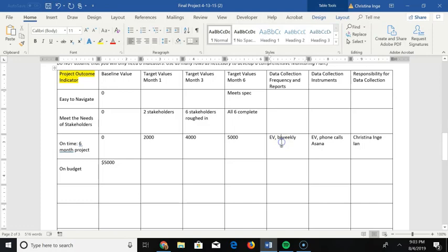And if you are going on a bi-weekly schedule, the assumption is going to be that the only reason you're measuring so infrequently is because you have close monitoring daily on an informal level with the team. In other words, you're all in the same place and you can check in on them several times a day. Otherwise, you really want to monitor much more frequently, even than every other week.